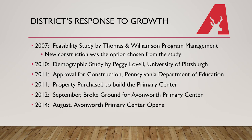In 2010, a demographic analysis was conducted to validate the anticipated growth of our district. This study was conducted by Peggy Lovell from the University of Pittsburgh, and her study did indicate that the district would continue to see growth. Following the demographic study, the district submitted the necessary documentation to the Pennsylvania Department of Education to receive approval for the new construction project. Approval from the Department of Education is a process in place to ensure school districts do not use tax dollars for construction that is not necessary.